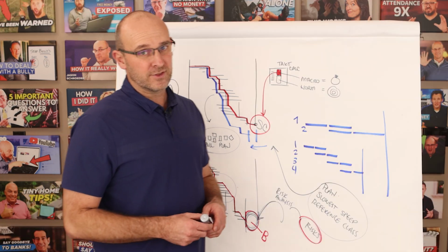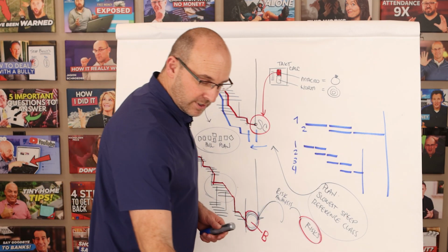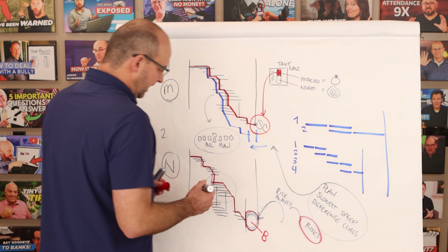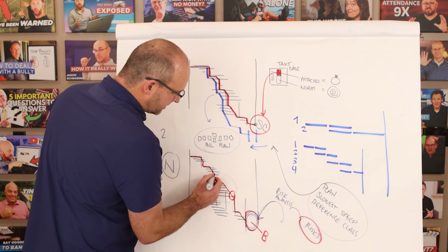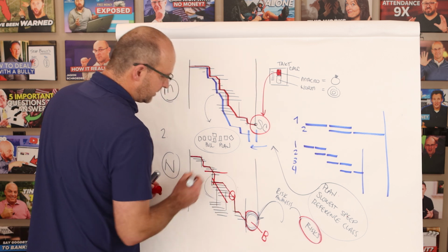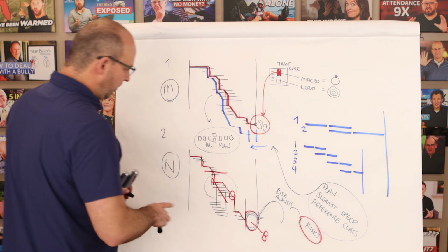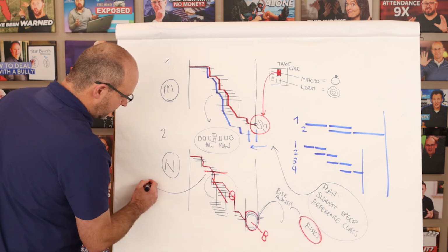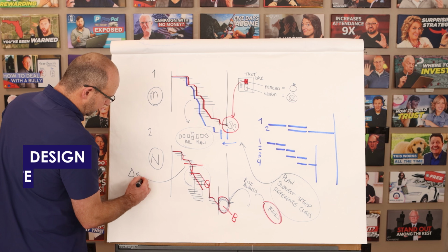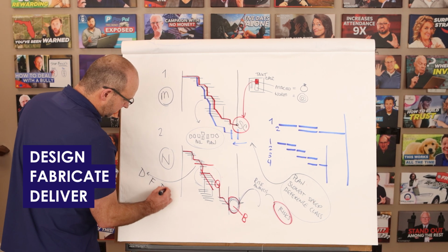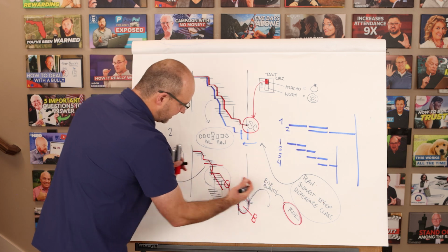Now there are some other things that can pull your project forward. Number one, and I'll go ahead and mark these in red, is if you have let's say a major problem or a slowest trade or a slowest zone, these are bottlenecks. Well in advance, because you've created this plan early enough, you can design, fabricate, and deliver differently to support these bottlenecks and narrow them.